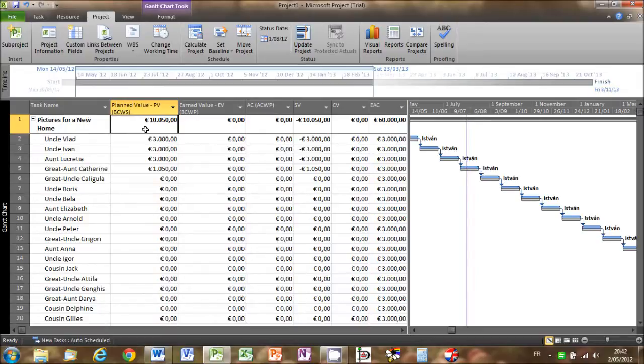On the plus side, the rich gentleman only agreed to pay the painter for work done and isn't obliged to pay him for sick leave. However, on the downside, we can clearly see that the project is behind schedule at this point. We could now go to the Earned Value Schedule Indicators table to see the schedule variance percentage and the schedule performance index, but there isn't really a need at this stage because the situation is very clear. The project is 100% behind schedule.